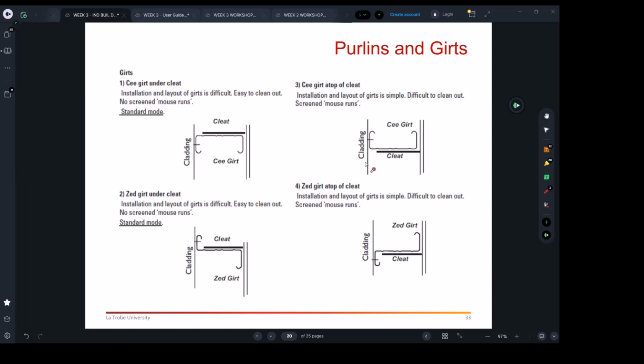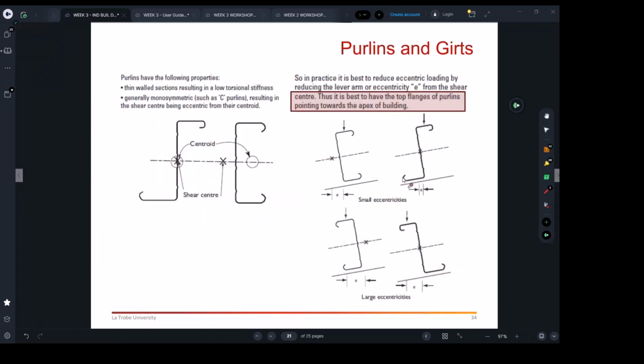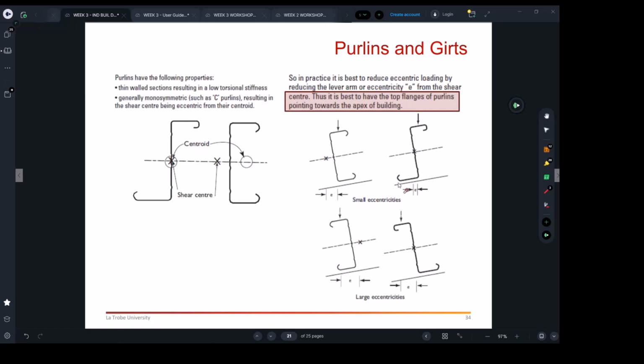That's one of the reasons why we look into those details, which are very costly and important for construction engineers, when they read the job project and want to find out how complicated it is, how costly it is. These details make a lot of difference. If you don't know about this and you find out you must build it like this and you must put sheeting, then you have to allow for that with your price and time.